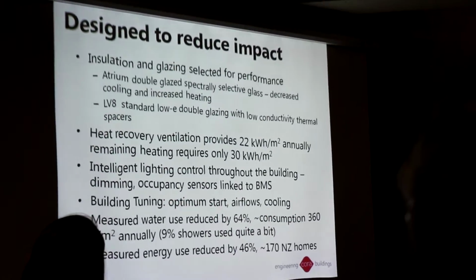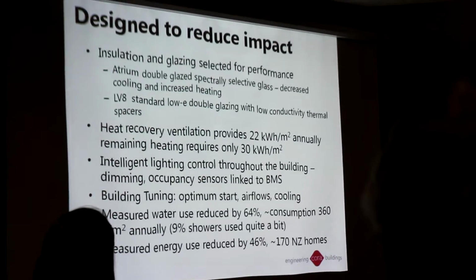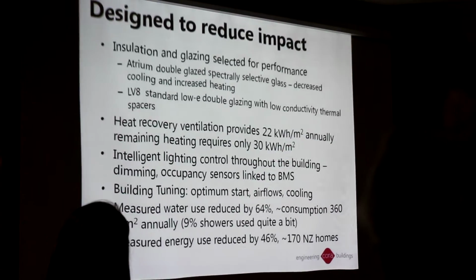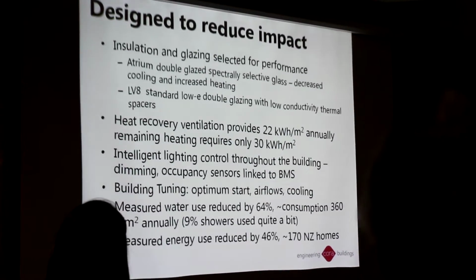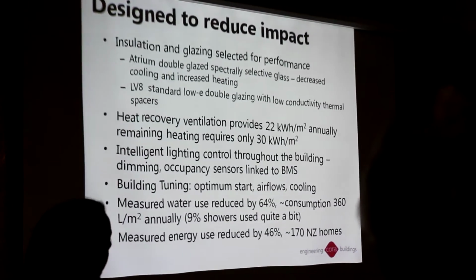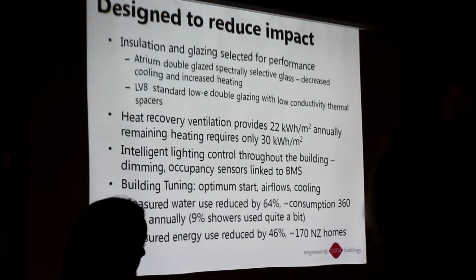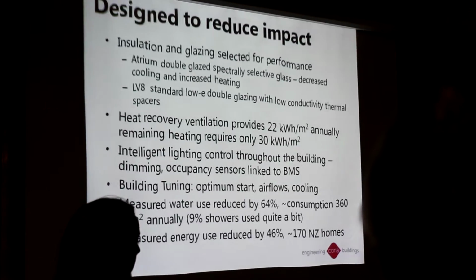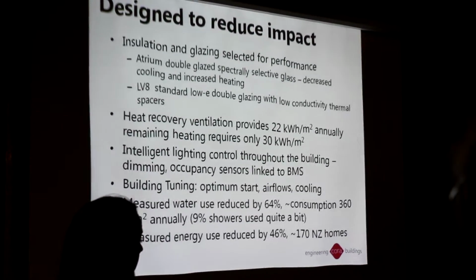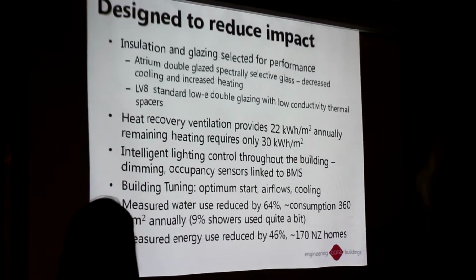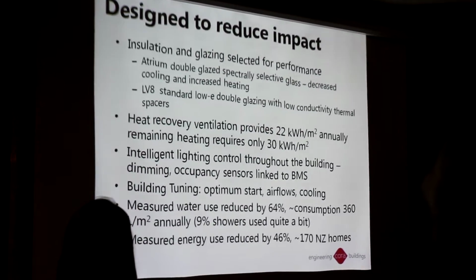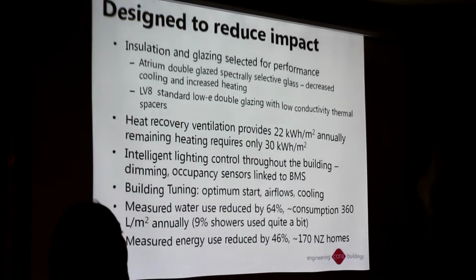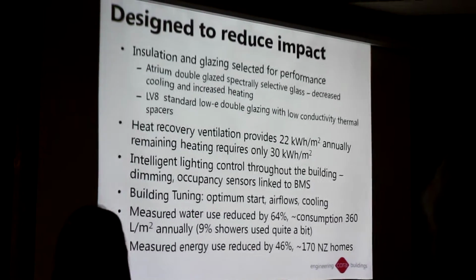The biggest one I noticed, and was surprised by, was just how wonky the optimum start was in this case, and how easy it was to fix because we had the tuning team on board and able to just go ahead and do that as part of the process. It didn't take a call from building management saying, hey, why is the boiler running when it's not supposed to be? It was already taken care of by the team. Also, the building tuning team, intentionally or not, ended up being the punch list chasers, which is always an issue in a big project. You've always got your punch list before you leave the building. Well, the tuning team was able to chase that punch list down.